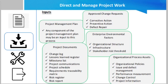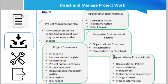The inputs for the Direct and Manage Project Work process include: the project management plan, where any component of the plan may be an input; project documents like the change log, lessons learned register, milestone list, project communications, project schedule, requirement traceability matrix, risk register, and risk report; approved change requests such as corrective action, preventive action, and defect repair; enterprise environmental factors including organizational structure, infrastructure, and stakeholder risk threshold; and organizational process assets including organizational policies, issue and defect management, performance management, change control, and project information.